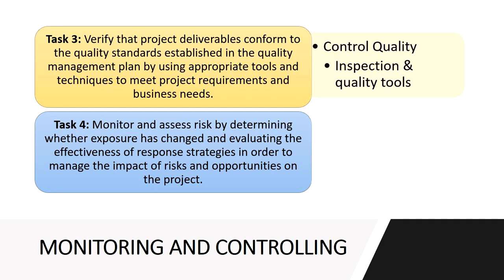Don't just leave the risks alone. Check up on the risks. Make sure that the risks are exactly where you left them. Make sure that the risks have not changed. And if they have changed, then you need to be updating the probability and impact. You need to be updating, in many instances, the EMV. You need to reanalyze. So risk reassessment is big in risk management.